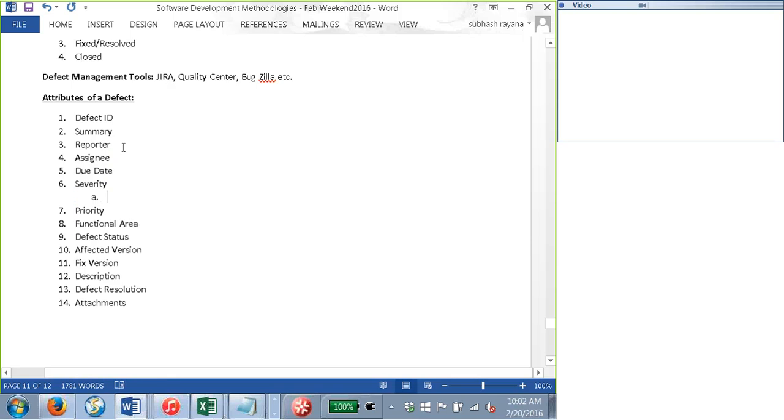Okay. You said that the lead will decide on the due date, right? Now, you're bringing a lead into the picture. Let's say the reporter reported it, so who gets the due date? The reporter, when they are reporting, normally doesn't assign the due date. I'm a QA, right? And I tested it, and I am reporting a defect. How can I assign a due date? I'm not fixing it, right? See, I'm asking you to construct a house. You have to come back and tell me how much time you would need to construct the house. I cannot come and tell you, okay, this is what I want, get it done in 1 month. Would you be okay with that? No, right? Same is the case here.